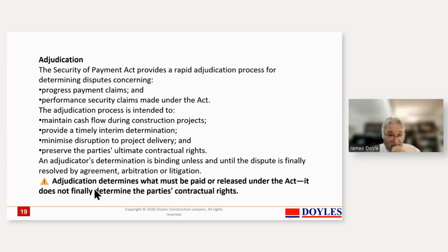But on the other hand, they have said that if he makes a mistake about the contract or about the facts, they won't really upset it. He's got an opportunity to make mistakes about the law and facts, but he hasn't got an opportunity to make mistakes about the process, about the things that he's to consider and the fairness of the process. So they've given him quite a lot of liberty to come to decisions that appear to him to be fair and reasonable, and yet they will maintain a supervision of him to make sure that he's following the process that's set out in the Act.